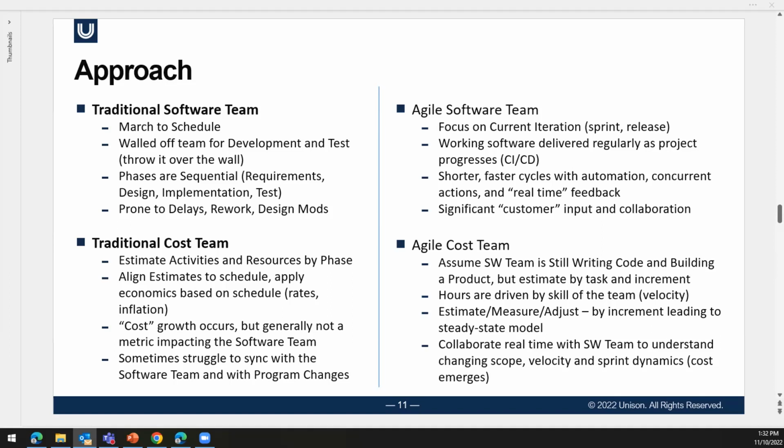Well, does the cost estimator have any responsibility to report implied changes in scope up to the program manager? Cost people aren't usually asked for a lot, and they're usually told they're wrong when they bring the cost to the program manager. But I think in this case, with the tools that we've been looking at and the things that I've seen, you can measure how much effort took place across, pick a denominator, across stories or across functions or across team members. And what you'd be looking for is the dynamics of that and plotting that over time.